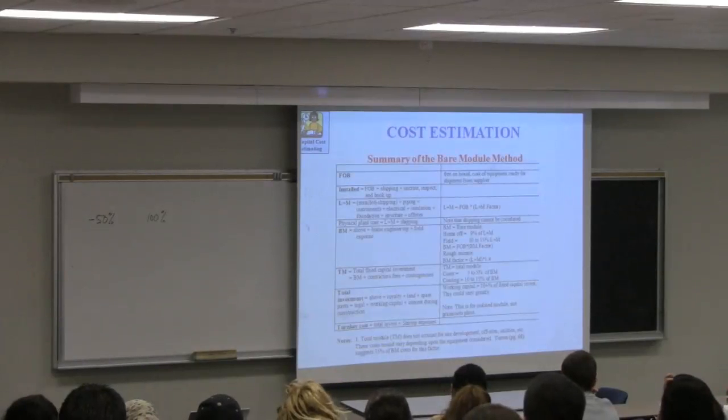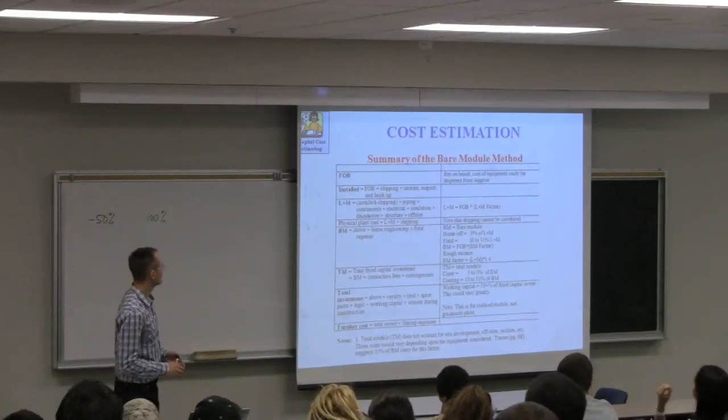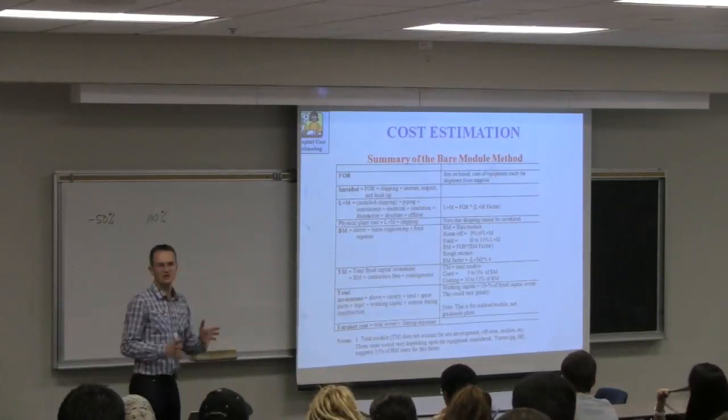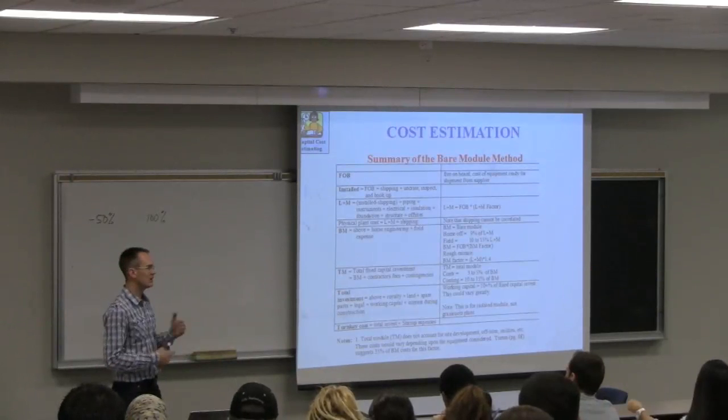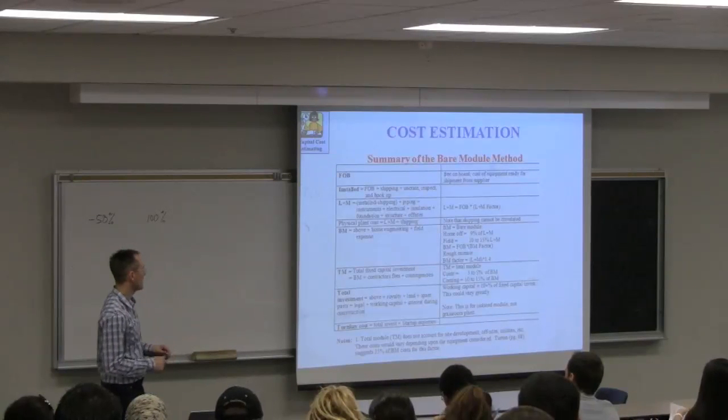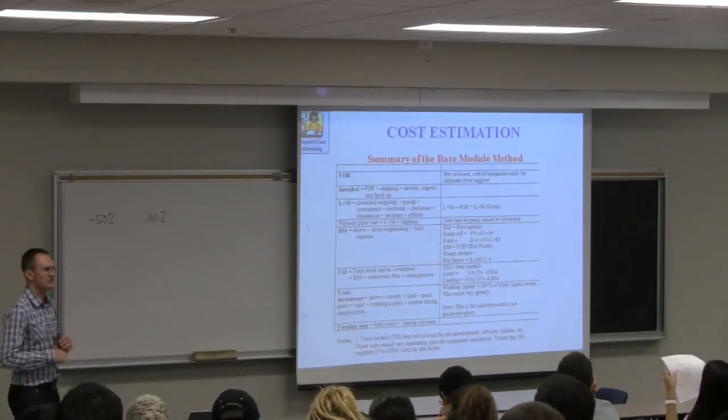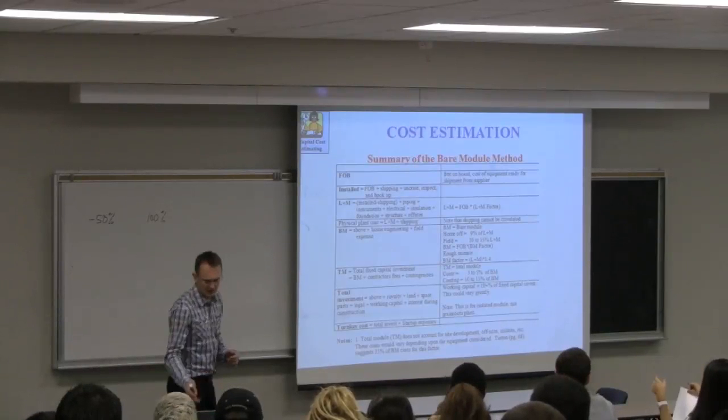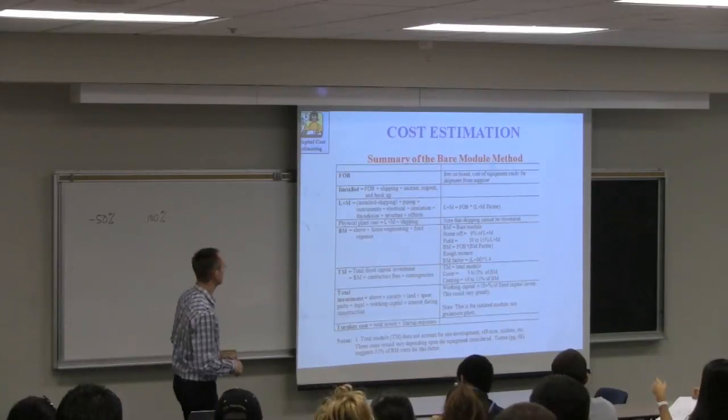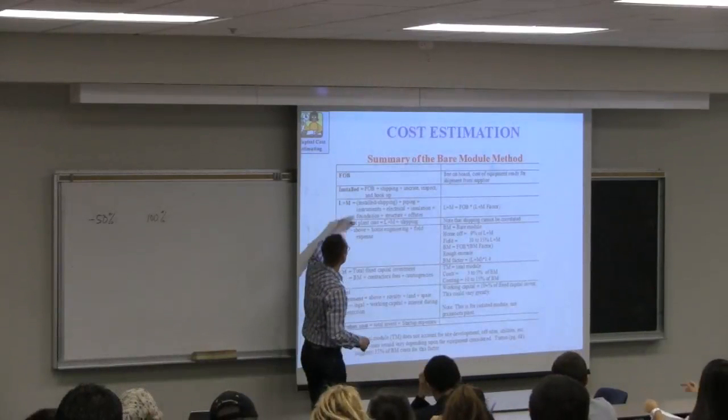So we're going to take a database cost for a known design at a particular point in time for a very specific configuration. Then we're going to multiply it by a capacity factor. So if this original design for a heat exchanger, for example, was for 100 meters squared, but our needs are for 400 meters squared, we're going to multiply up this base case of 100 meters squared by an appropriate factor for our needs.